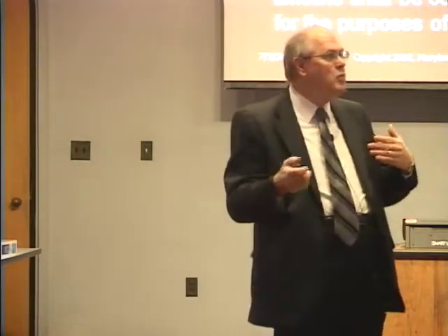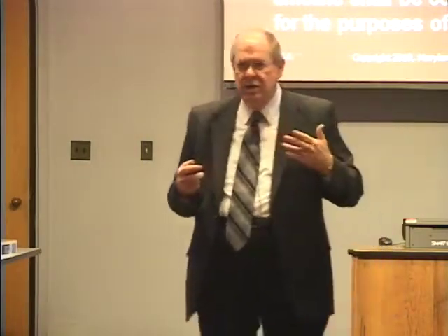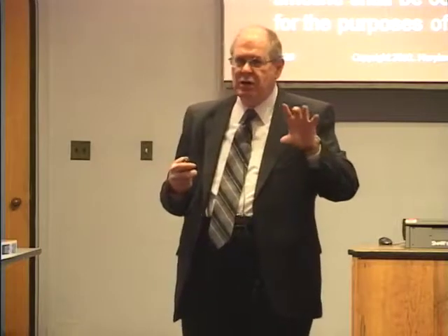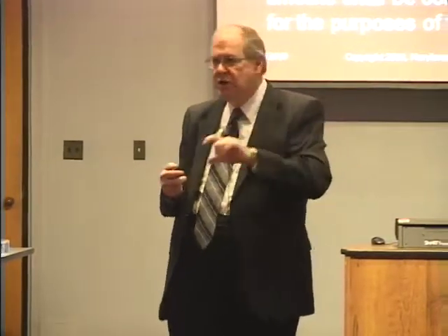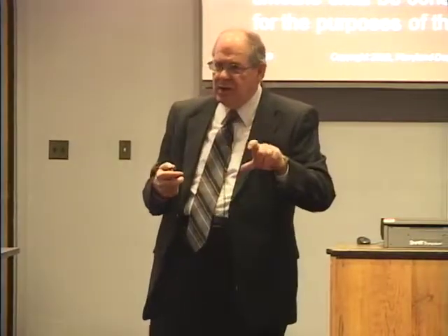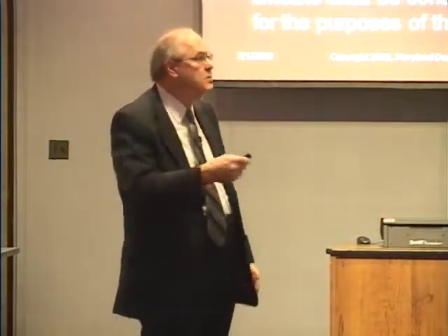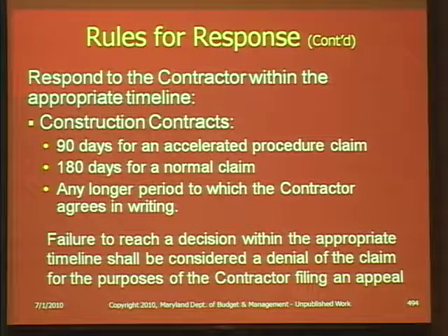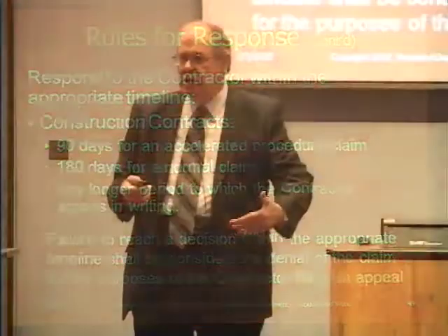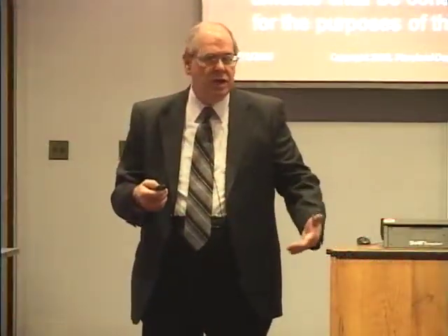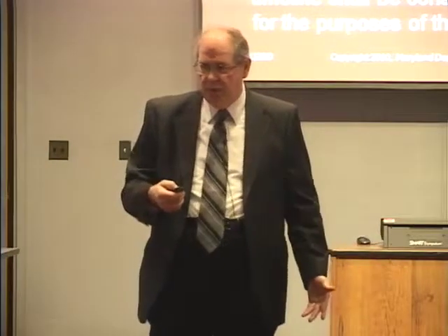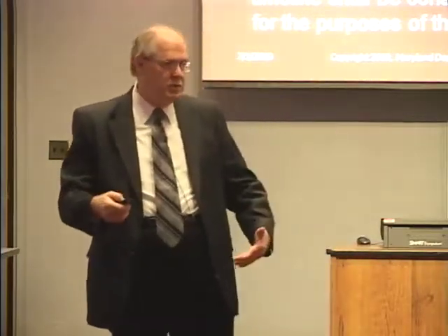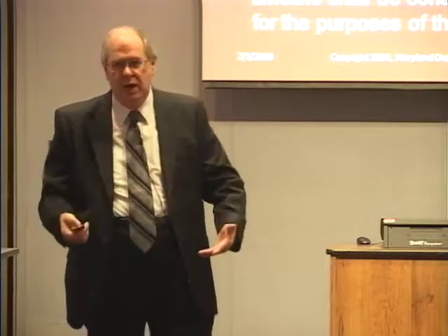So now what we are required to do, and I think actually the language in the clause having to do with claims was changed after that to put vendors on notice. So it is now in the actual wording that says, in the event you don't have an answer if it's construction within 180 days, you still must file a claim within 30 days from the 180th day from when you filed the claim. So they know a non-answer is essentially a denial.